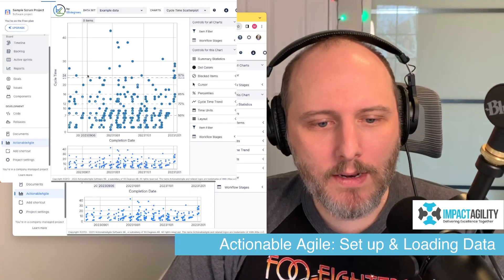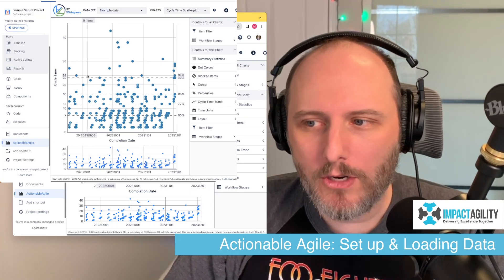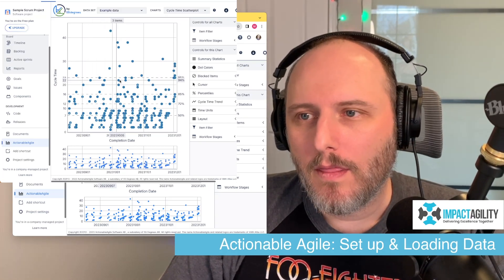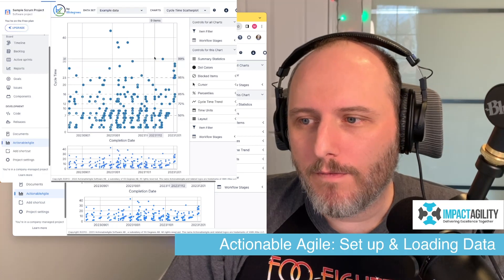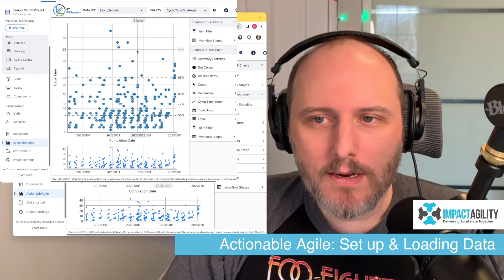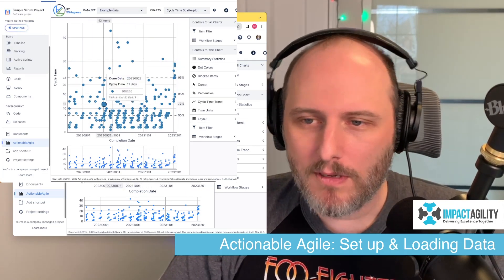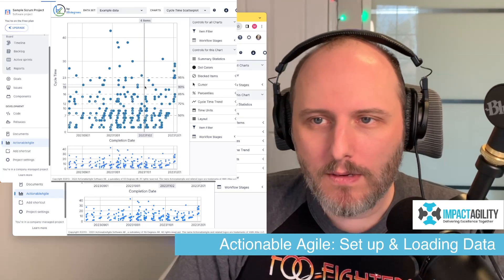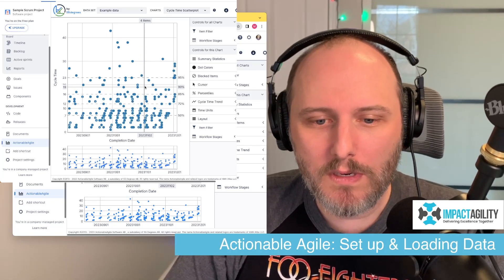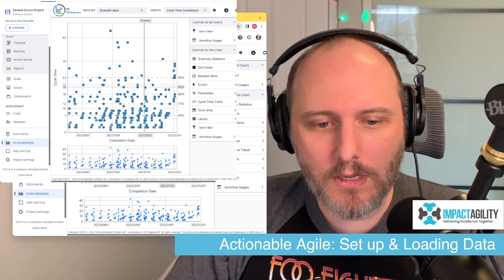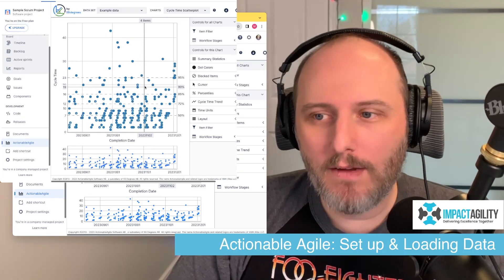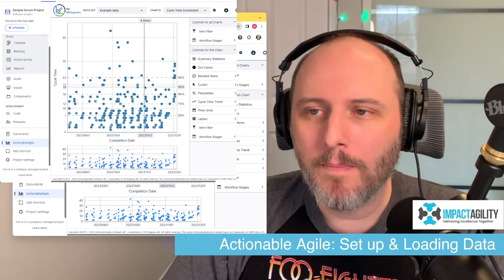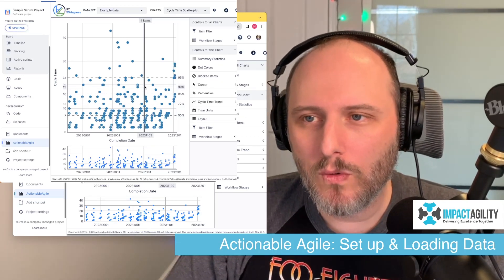Even though we are in Actionable Agile through Jira, the first bit of data you're going to see is still just example data — fake data so you can figure out how to use the tool. So we still need to actually load our Jira data, even though it's a Jira plugin.